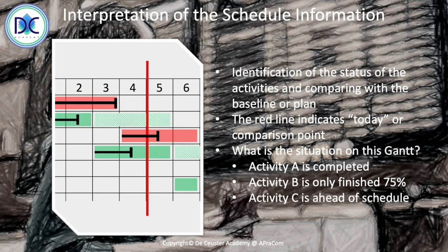And based on this, we can calculate or estimate when the different activities will be completed. What is the effect on the schedule? Because once an activity is late, it may indicate that our project may be late also. Certainly when we have delays on critical path activities, the project manager can evaluate this information.